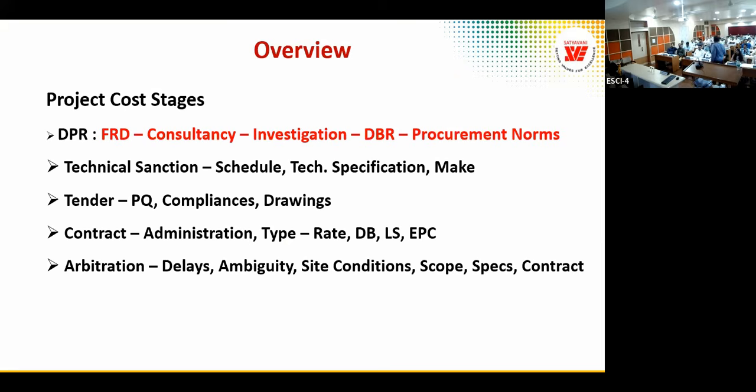Assets and liabilities, you should have positive. I have introduced current networth. Current networth is current liabilities versus current assets: receivables, creditors, debtors. Because at that time, most of the construction infra companies were going through financial strain because of BOT projects, overdrive in BOT and all that. They are financially very weak.